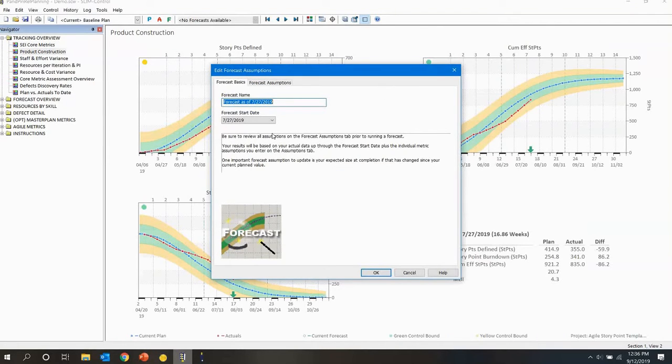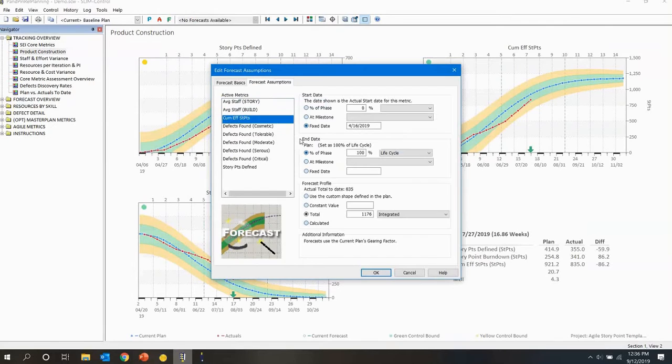The forecast always gives you an as of date, and here this is showing you all of the metrics that we're tracking in this particular plan, not a huge amount. And when we run a forecast, our plan data comes up. How many story points do we expect to deliver in the first place? Comes up, and you don't need to change these in a forecast, but you have the opportunity to do that. You could do a what-ifing here that says, well, what if it's smaller? Could we bring the schedule in? And very similar to that size sensitivity view that I accessed in Slim Estimate.